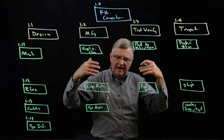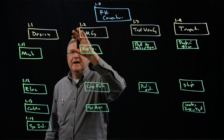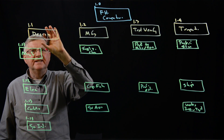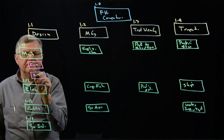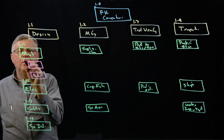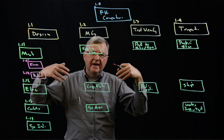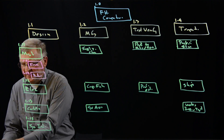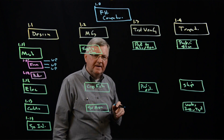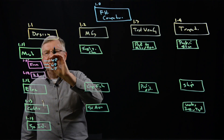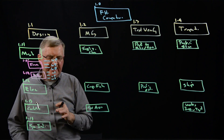This can go on depending upon the level of detail the project manager prefers. We'll put the fourth level in here. Under the design element, under mechanical, we have design of the frame and design of the brake system, labeled 1.111 and 1.112. These labels are important because they help us consolidate and manage this information, especially when managing the budget. The fifth level consists of a series of work packages — the specific tasks needed to complete the mechanical design of the frame or the brake system.